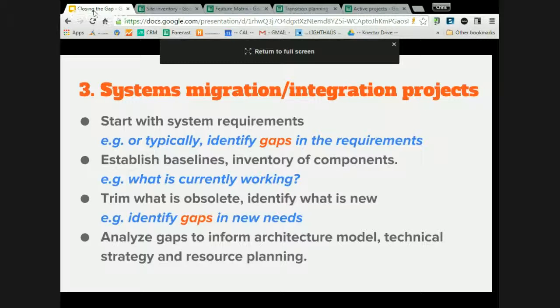Let's filter this list now by which features are buggy. Good to know. That's a useful thing. Here's a nice bug list, someone. What are the features that need more documentation because we're not clear on whether they're going to stay or go? Great to know. So whatever it is, you're building a big picture plan of what is otherwise a complex system, asking a series of gap analysis questions to reduce the scariness level, and ultimately the risk level.